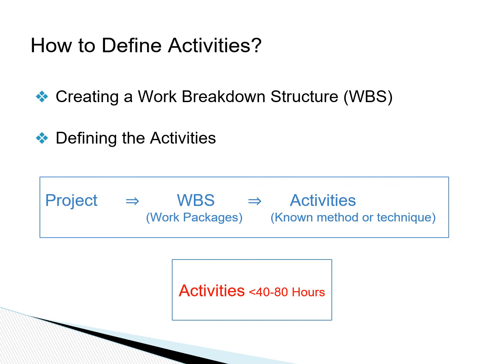Generally, we need to break down the project into small enough pieces that are not longer than 80 hours and preferably not longer than 40 hours. By doing that, each activity can be well managed and not impact other activities in our project.